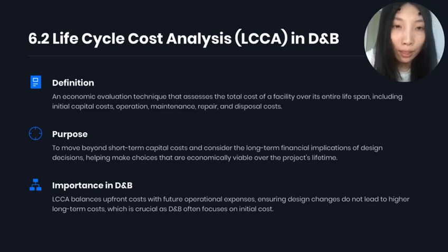This is particularly important in design and build procurement, where the project team often focuses strongly on early price certainty. Without LCCA, design changes might be approved simply because they appear cheaper or faster in the short term, but they may create higher long-term operating or maintenance costs.